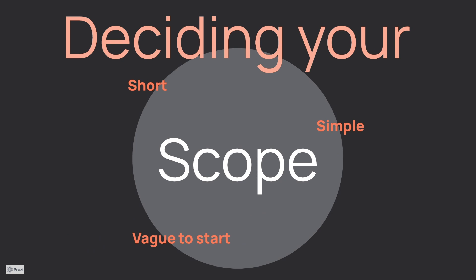The next thing we want to talk about is when to and when not to change your scope. Changes in scope can be both a blessing and a curse. It's okay to make changes to your scope when you're responding to feedback, or when you're streamlining a feature, or whenever you're making an improvement to your core ideals for the game. When it's not okay is when you're constantly adding just one more feature, just one more thing. You really want to be refining your scope, not adding to it constantly — that's called scope creep, and it is a project killer.